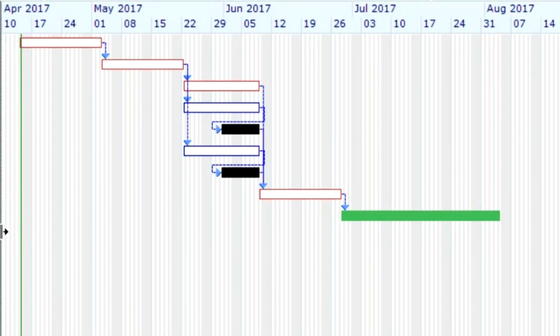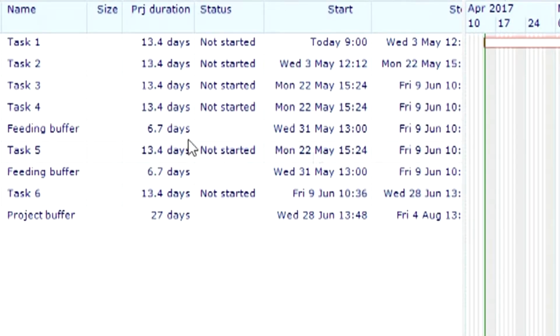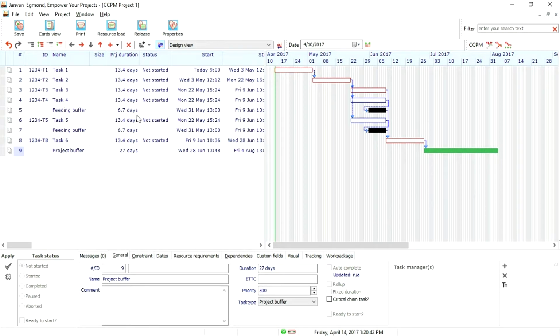And although it looks like the engineers get less time because of the task time reduction, in fact they get more. Up front we have explained that if they report their task completed directly when they are done, and don't start gold plating, they have full access over the complete project buffer. They don't need to worry anymore that they won't have time to complete their task or that they will be blamed for any delay. Actually, they like the idea.